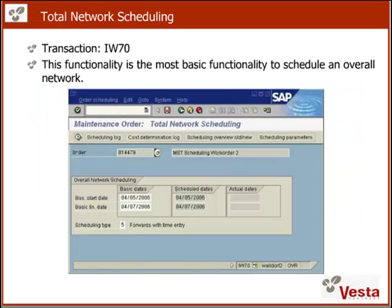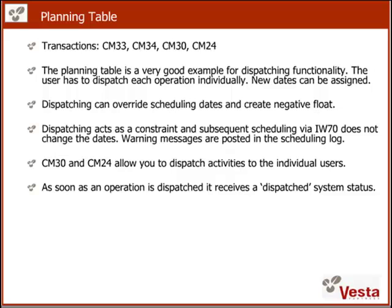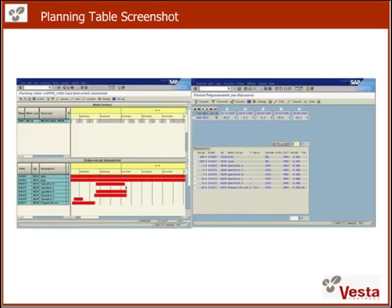Another option in SAP is the Gantt chart view, which shows your work order operations in a classic Gantt chart layout. You cannot make modifications to operations in this screen — it is purely for visualization purposes. The next scheduling option is available in transaction IW-70. It allows you to schedule a network or a complete set of work orders taking relationships and constraints into account. The planning tables in SAP come in multiple variations and allow you to dispatch work centers — usually groups of people with the same skill — or individuals. In comparison to scheduling, dispatching is a manual assignment of work to a resource for a specific time. You have the choice between a graphical view or a tabular view.